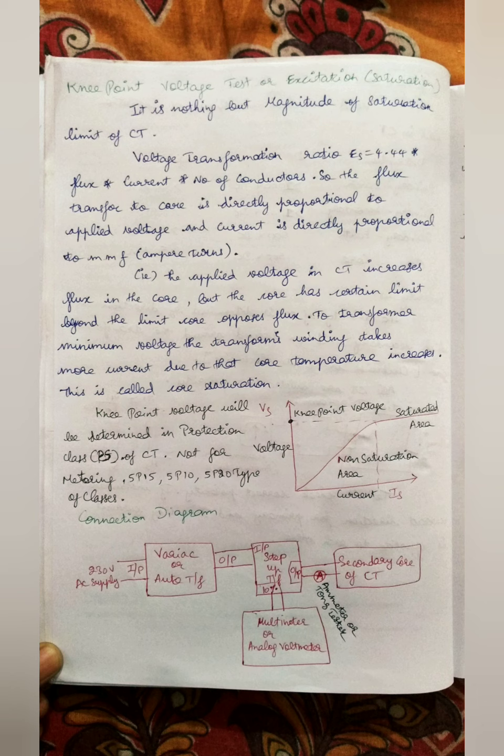Normally the knee point voltage is determined for your protection class or protection special class of your CT. This knee point voltage test is not done for metering and 5P15 or 5P20 kinds of CTs, because the PS protection special class type of CTs are used mainly for your main relay protections, as I said, differential or REF or distance kind of protections.